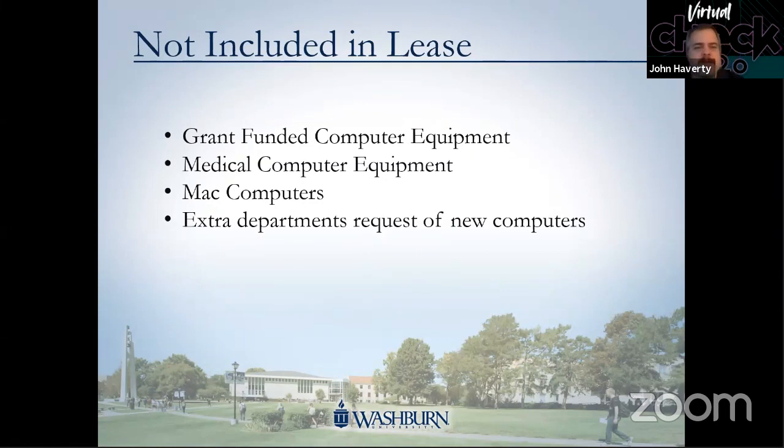Kind of going back to what I was mentioning before, some items were not included in the lease that we could not do or did not want to do. Mac computers are not included in the lease at all. We didn't want to include those. One, they couldn't easily be included in the lease process. But also, as part of refreshing the inventory, we wanted to find those systems that were grant-funded computers and not have those be part of the lease. We didn't want to have those be in the normal cycle.